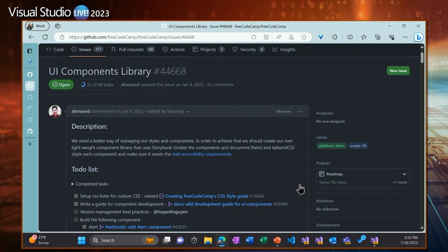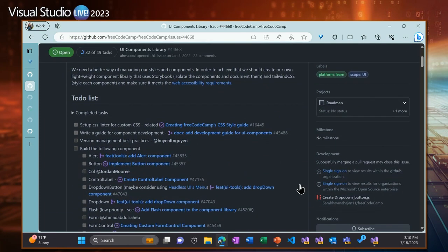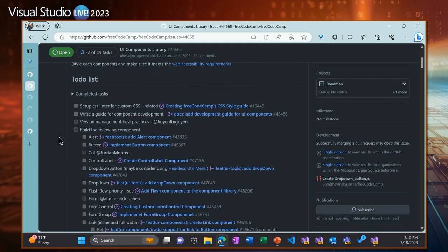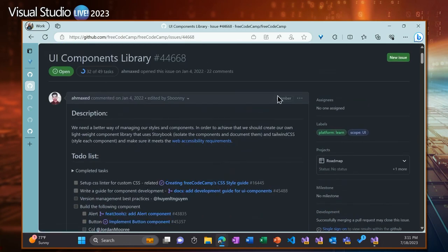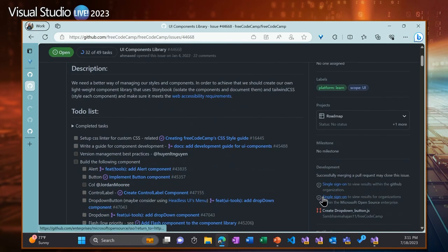that instead of being something that's tracking a bug or a specific item, this UI components library ticket is actually a higher-level view of the work that needs to be done for this library. So they're taking advantage of one of the new features in GitHub Issues, which is the task list. It's a really awesome, customizable, lightweight, quick-to-move-around way to organize issues together. So you still have that organization that you might get from other project management systems, and it's built right into that description window, so you don't have to click around to another tab to see all the linked items. You can quickly see the status.